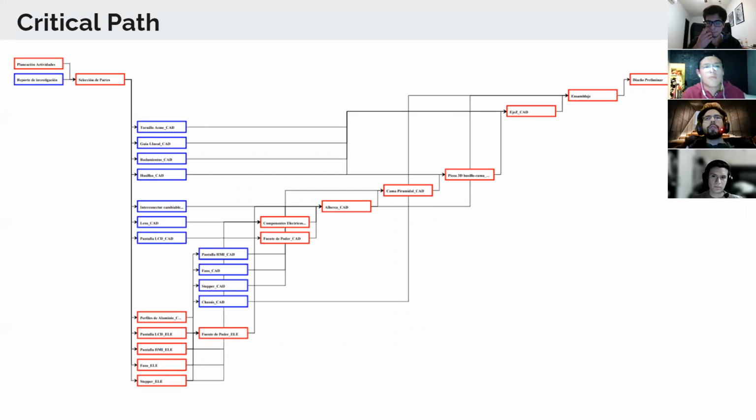The Gantt diagram helps us to segment the tasks and understand which ones were the priorities. As it can be observed, the ones in red form the critical path, starting with the planning of tasks to the selection of the most important parts such as the motors, fans, LCD, to then choosing the power supply. There is some slack time with the other tasks. Nevertheless, all the following tasks are critical. The final tasks are final testing and delivery.